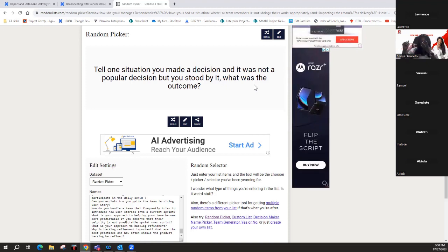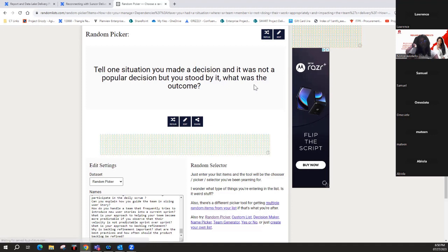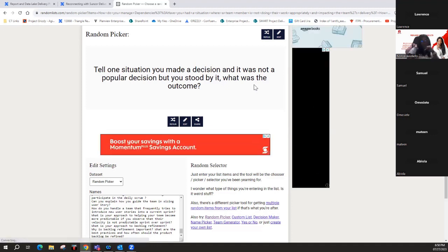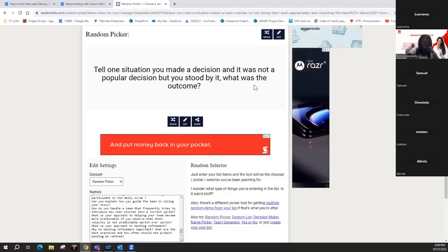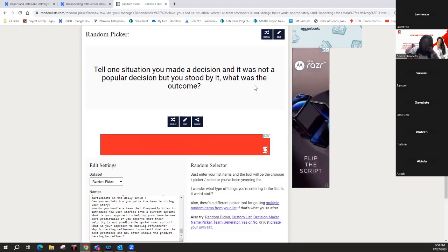Before you move forward, you said something about the confidence vote, right? So the confidence vote was on what grounds, on what terms? It's on the work that the team has to do for the quarter, how confident they are that they can do the work. Based on what they've committed, how confident are they that they can deliver it? So if they have low confidence, that means there's a problem, and we have to problem solve it.